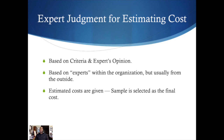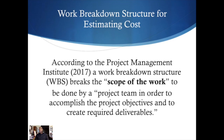The second method is expert judgment for estimating costs, which is based on criteria and expert opinion. Many different experts give their estimate of what the project costs would be — often from outside the organization. After all estimated costs are given, a sample is selected for the final cost. The third method is the work breakdown structure. According to the Project Management Institute, the WBS breaks down the scope of work so that the project team can accomplish objectives and create the required deliverables. The WBS breaks work into work packages, each with associated costs, and when those work packages are summarized, you have a cost for the program.